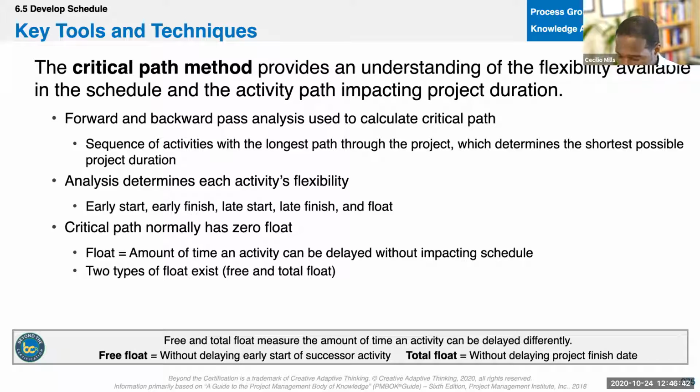All right. So what should we see there? We see early start, early finish, late start, late finish. And then we'll calculate float by subtracting early finish from late finish. That's how we'll do that.